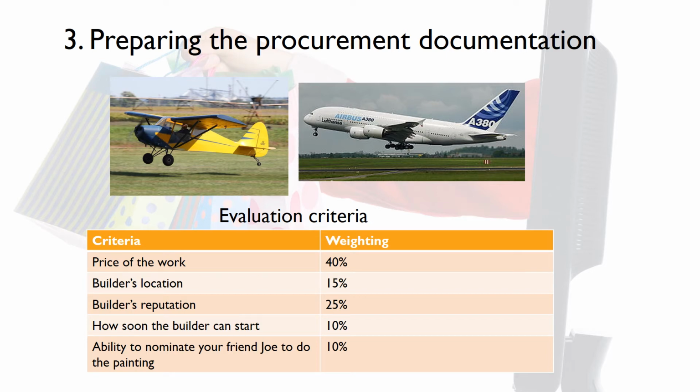In project management, we call this comparison tender evaluation. And you document the evaluation criteria now because the contractors need to know what you consider to be important. It will inform their bid to do your work. Not all evaluation criteria are equal, and so we often give them weightings dependent on where the client's priorities are. In this step, you need to identify the criteria, which might be something like cost, experience in similar work, size of the organisation, or the speed with which they can deliver the work, whether they have insurance or can implement a quality control. To recognise the different priorities, we give the criteria weightings which add up to 100%.